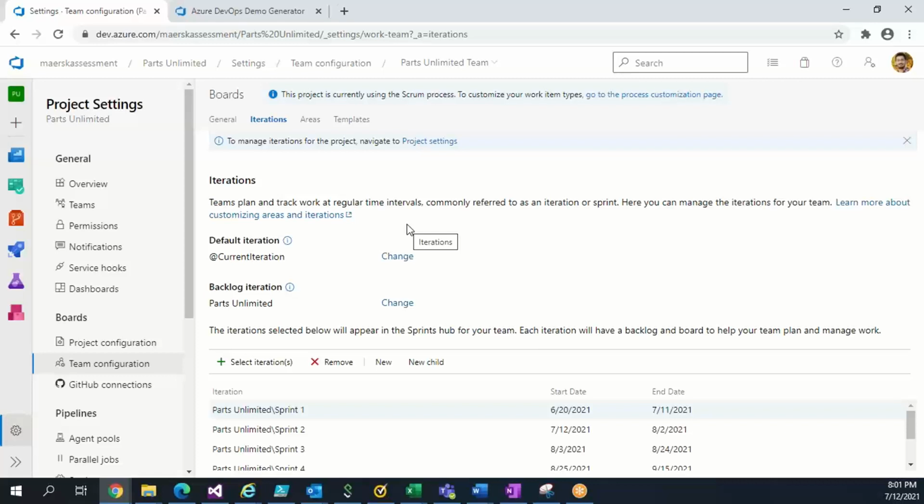Let's say your project is of 6 months. It's not like they give you the 6 months at the start and after 6 months ask you, okay, what have you done. It's not like that. They define small chunks of work, which they call a sprint. It can be 2 weeks, 3 weeks, 4 weeks, whatever. It depends on your project requirement. That we call a sprint.